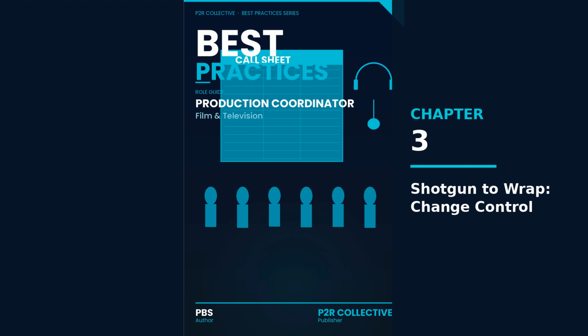Quick warning signs you can watch for. People ask, which schedule are we on? Someone marks shots done during a hold. Your tracker and your call sheet disagree about today's scenes. Practical takeaway: change control fails when you separate schedule updates from tracking rules, and when you let multiple truths exist at the same time. Closing: make change control part of your daily wrap-up rhythm.